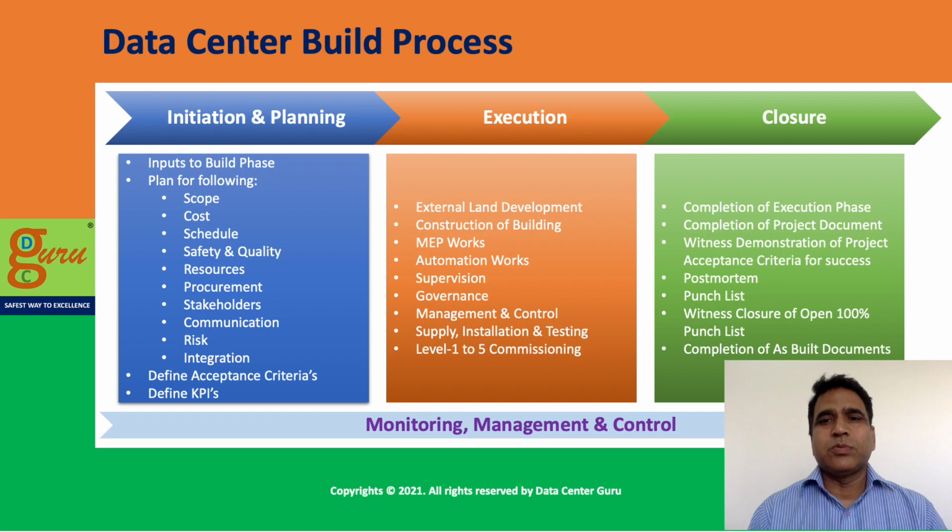Then you do the post-mortem on the site, identify the punch list, give the punch list to them and ensure that all those punch list items are completed 100%. You evaluate the as-built documentation submitted by the project team so that it is 100% aligned with the actual implementation on the site, and then that completes the project.